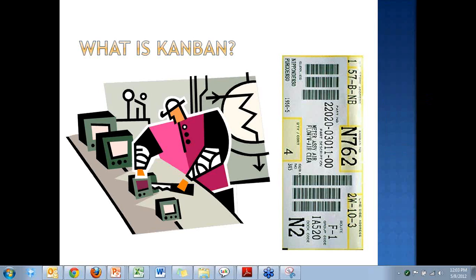Scrum really out of the gate was the big push that everybody went to for implementing Agile. Folks are finding over time that it works great — Scrum is fantastic, I really like Scrum, if you can do it. But Scrum takes a little bit of work. You have to have a dedicated team that is truly cross-functional, a dedicated product owner who's really going to be available, and you have to be able to estimate how much work you're going to get done within an iteration and complete all of the work — the testing, the development, the UI — within your one iteration timeframe to make Scrum actually work.